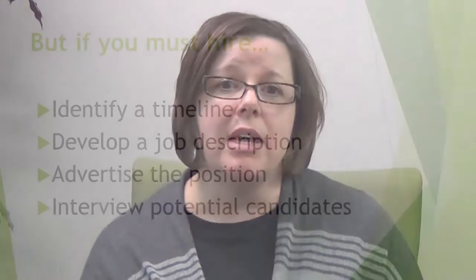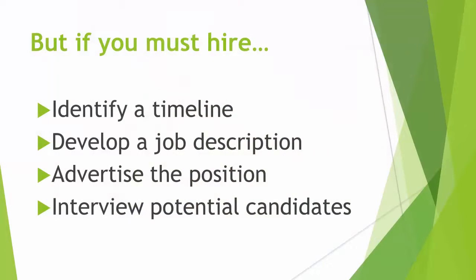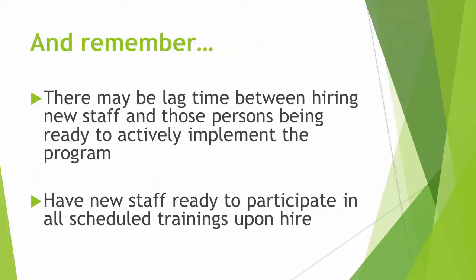If you determine that hiring new staff is essential, the next step is to identify a timeline for the hiring process. Be sure to plan for time to develop a job description, advertise the position, and interview potential candidates. Even after a hiring decision has been made, there may be lag time before bringing a person into an active implementation role. A key consideration at this step is ensuring you have staff ready to participate in any scheduled training.